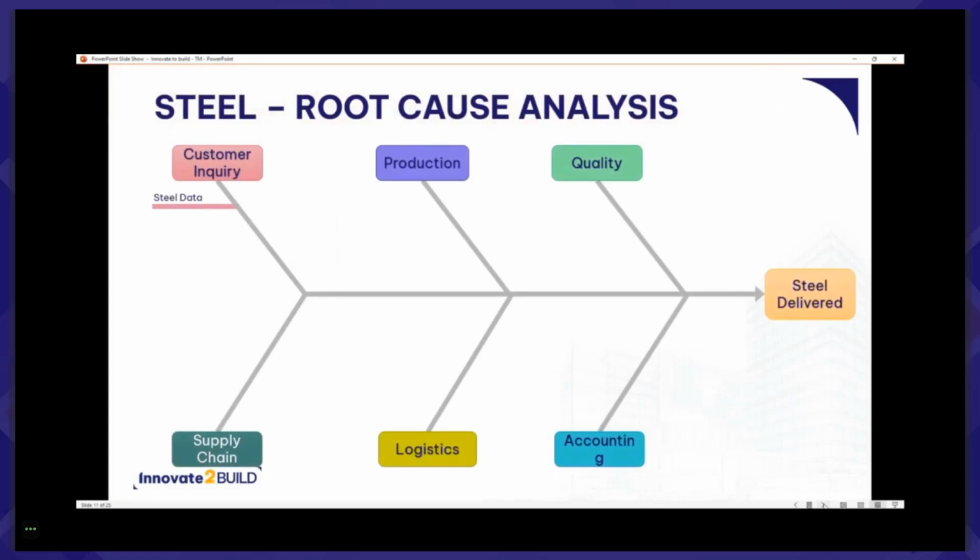Now, this is what happens in the upfront. So when we talk about customer inquiry, it's really about receiving not only the information pertaining to the project, but when receiving the engineer's design drawings, if you're not offering the full turnkey, you're then first detailing the project, bringing it into that level of detail required for fabrication. And when detailing, you're assigning all the different part components these different numbers, to then be able to facilitate management of the project in the workshop, in the purchasing department, on the shop floor, and in the shipping department as well.